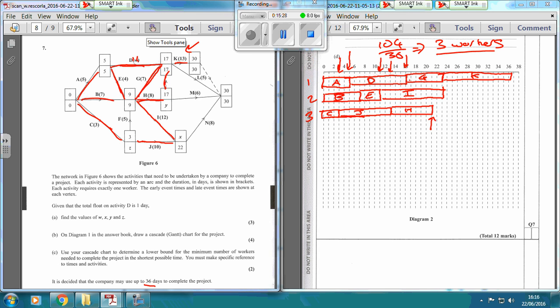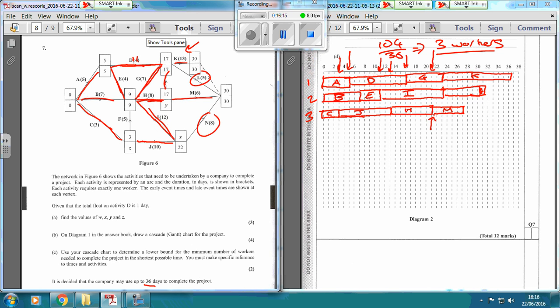Fast-forward the clock to 21. We can't start N yet because I hasn't finished. But at day 21, worker 3 finishes H, so we can start M, which is the next biggest. 21 plus 6 is 27. Then when I finishes at 23, we have N and L left. N is the biggest, so start that one - 23 plus 8 takes us to 31. That's N.